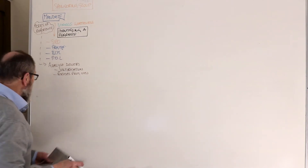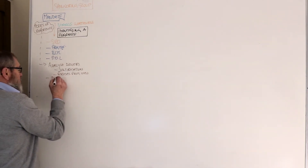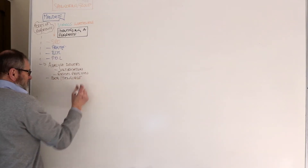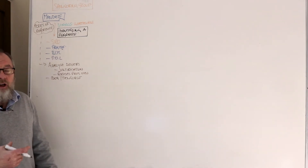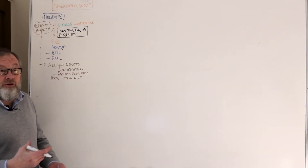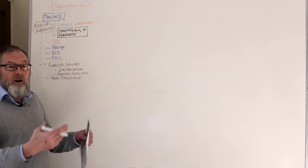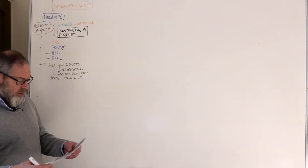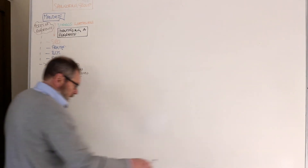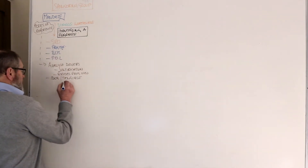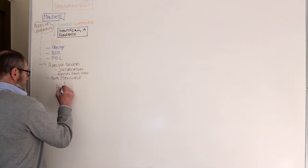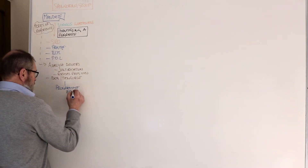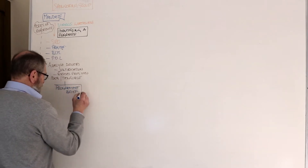We need to take a formal program view of the initiative and make sure that we have a good, tangible idea — something we can get a feel about — because we're going to have to write the vision for it. The vision's got to define how we are seeing ourselves in the future. So the output from here is going to be the program brief, which is the first main document.